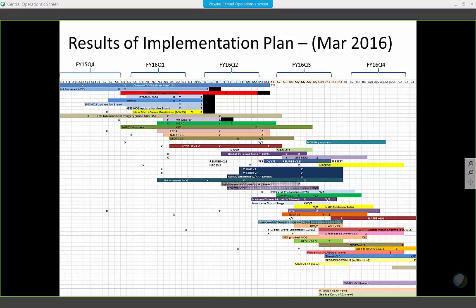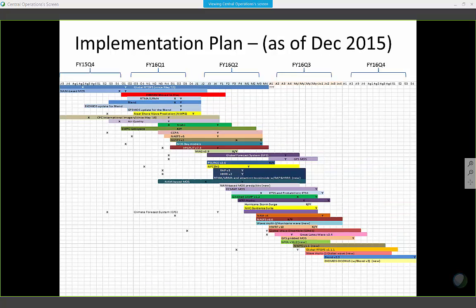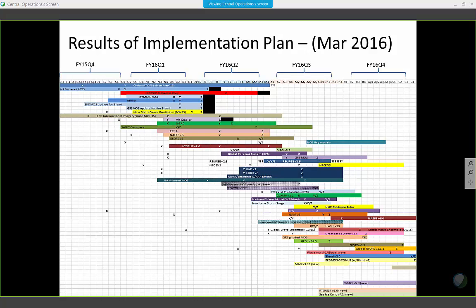Which one's that, Phil? That's the dark blue bars in the middle, the wrap and the her. At least a month. And I also moved the front of the color to reflect that. We're picking on the wrap and the her, but you can see the blue started in January, and now the blue started at the end of February, which is when we actually got the code. Then you're going to window down into each quarter, but this is just for high-level visibility.